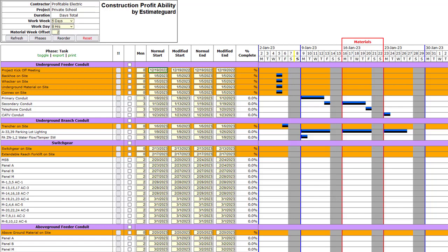The way this would be evaluated is by taking the material list for the task being performed during this week and walk the task down to make sure the material they were given to complete this work will satisfy the needs. Occasionally, there are site-specific materials that will be required to overcome unforeseen obstacles. By walking these down 3 to 4 weeks in advance, we should be able to get this material on site well before we need it and eliminate hurry-up runs to the supply house.